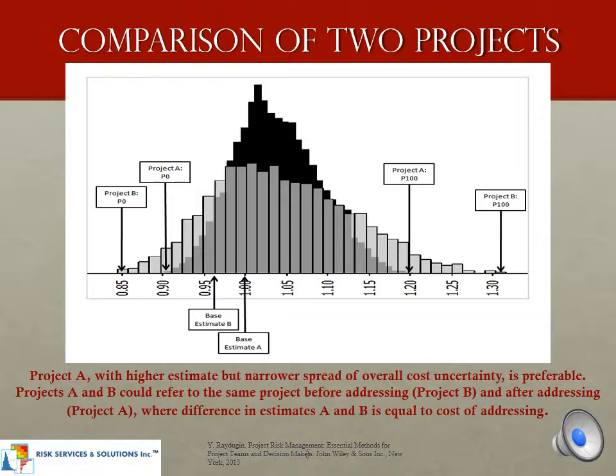Projects A and B could refer to the same project before addressing, Project B, and after addressing, Project A, where the difference in the estimates A and B is equal to the cost of addressing.